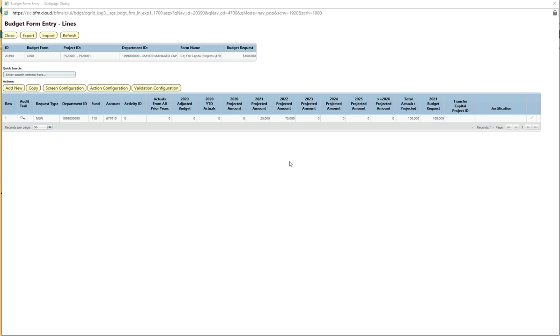The projected amounts are required and very helpful for long-range planning, reporting, and effective resource allocation. So please complete the projection columns. Account level accuracy for projections is not needed. The important part is that the total projection for each year is accurate, and users are encouraged to put the projection on one account line for simplicity.